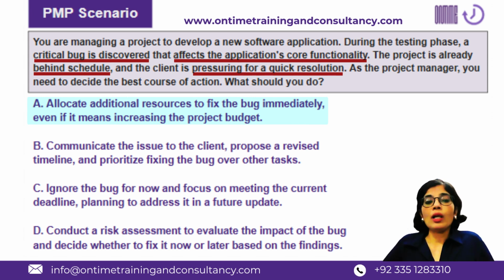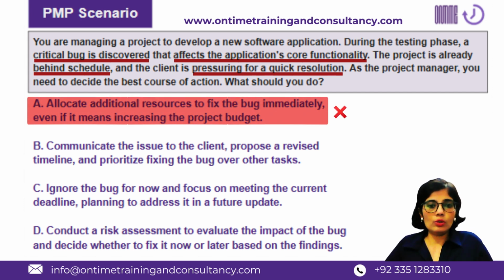of project management. So if you directly go with budget increase, that may impact, of course, the project budget, number one. And this is like the first and the foremost thing that we may think of. Number two, this is against the principle of change management, budget governance, approval cycles in the project. And number three, this may impact your current prioritization, current resource assignments and allocations, and may disturb like the whole project life cycle, right? So option A is definitely not the first thing to do, or not the best thing to do in the situation.